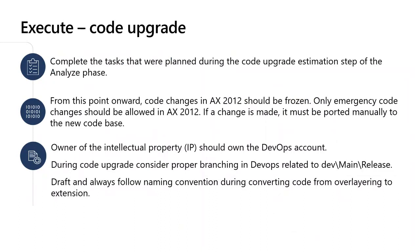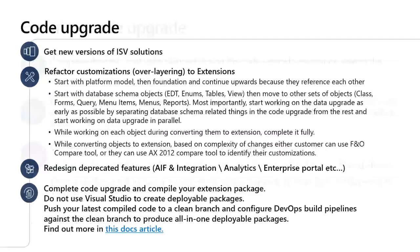The third step is to perform the code upgrade activity. You need a development environment to complete this. Complete the tasks planned during the code upgrade estimation step of the analyze phase. From this point onward, code changes in AX 2012 should be frozen — only emergency code changes should be allowed, and if a change is made it must be ported manually to the new code base. The owner of the intellectual property should own the DevOps account. During code upgrade, consider proper branching in DevOps (dev, main, and release). Always follow naming conventions when converting code from overlaying to extensions. Customers should get new versions of ISV solutions from their respective ISV partners early, as this takes time.